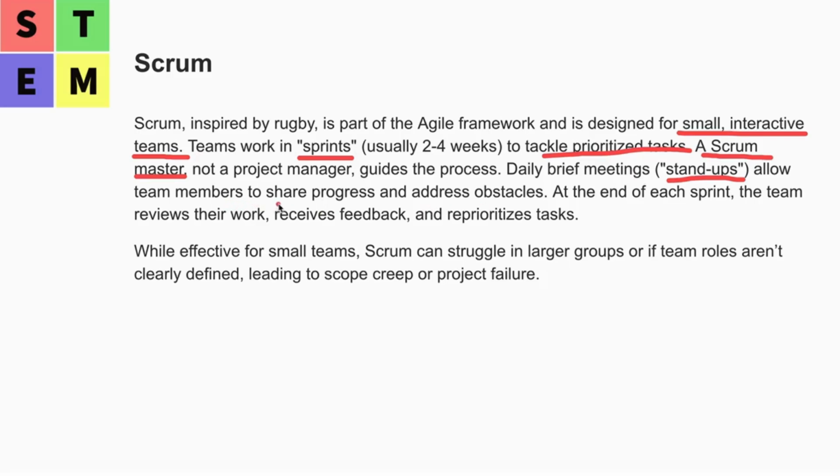So each team member shares progress and addresses obstacles, talking about those three topics individually. That's the stand-up meeting. And at the end of each sprint, there will be a sprint retrospective, and there will be sprint planning for the next sprint.